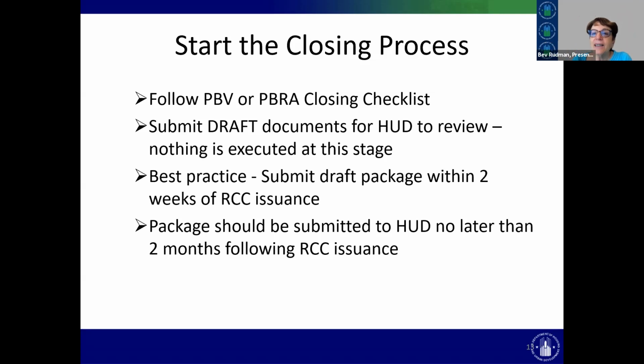So the best practice that I would like to encourage is that you really be ready for closing when you get an RCC. I mean, you're in closing now. So hopefully you're ready for closing, and within a couple of weeks of the RCC issuance, you and your lawyers can send in all the packages for review. And by sending it in, what that means is you upload it onto the Resource Desk for the program review, and you follow the directions of whatever field counsel has been assigned, so that you give them their documents in whatever form they want, and that will help them with their review.